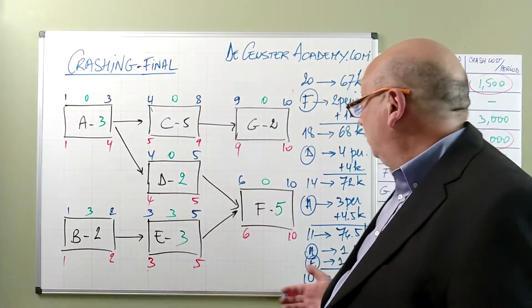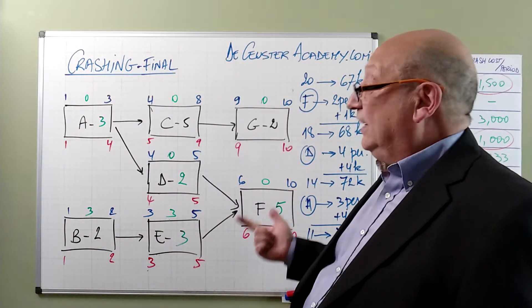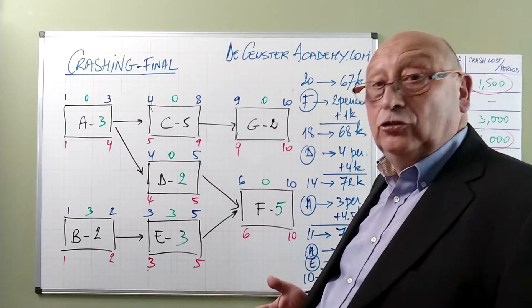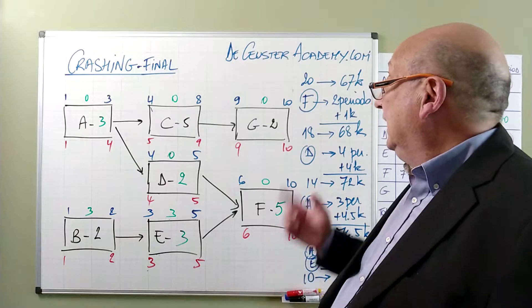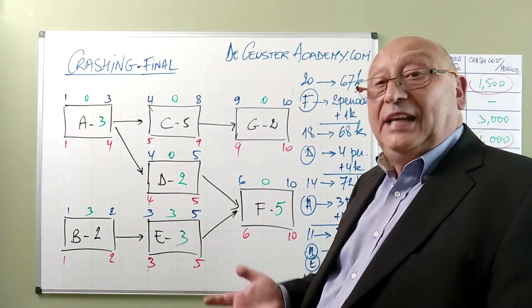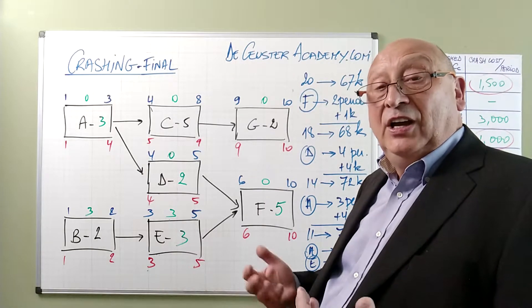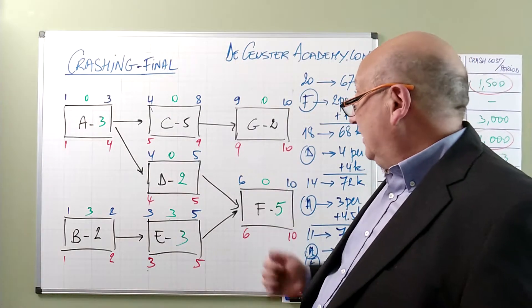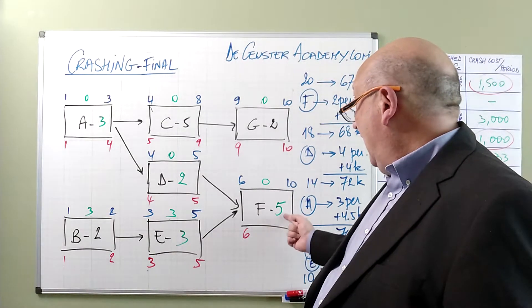The final duration of the project is 10 periods. We crashed activity A with three periods, so to four periods basically. C and G we didn't crash at this moment, but we can still crash them, but they will not have an effect on the duration of the project. D we crashed to two periods, F to five periods, and E to three periods.